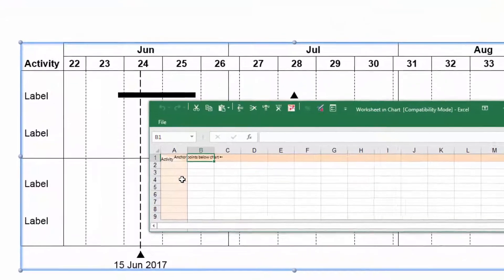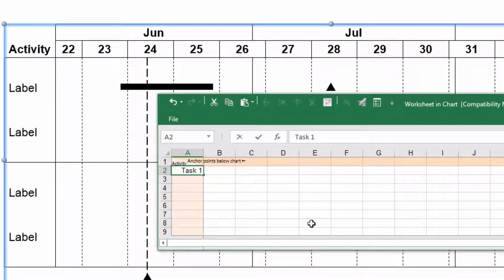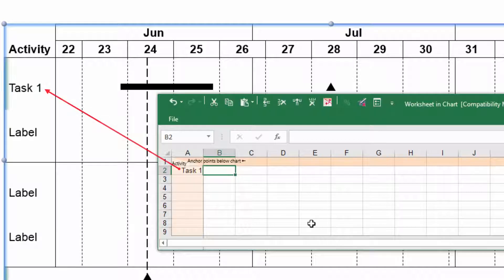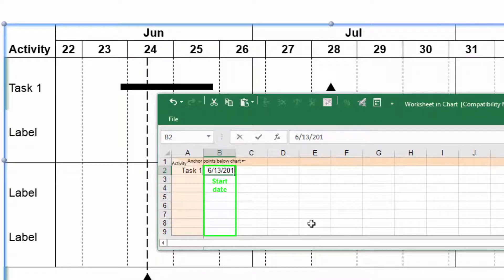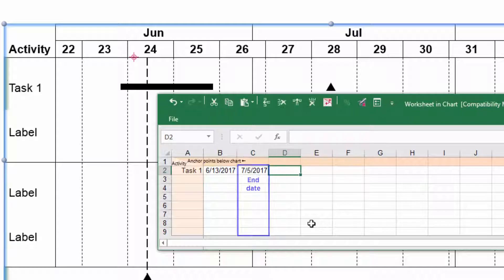Enter the description for the first activity into column A of the second row. This will be displayed in the activity column of the chart. Type the date for the beginning of the first task into column B. Enter the end date of the task into column C and the date for the milestone into column D.